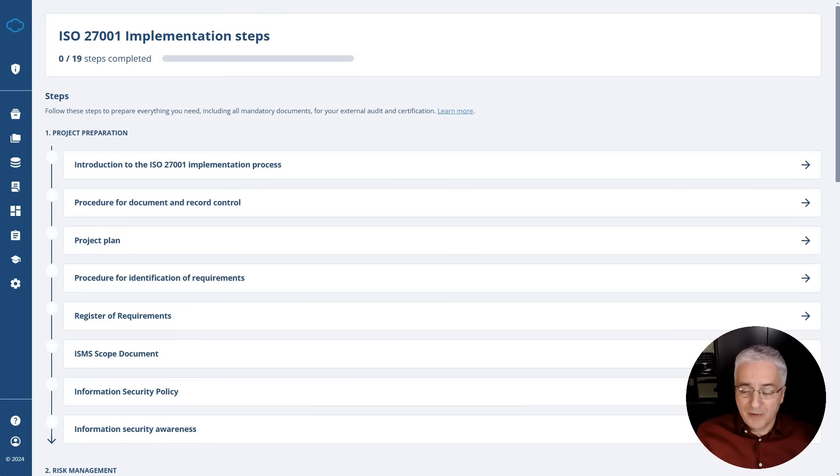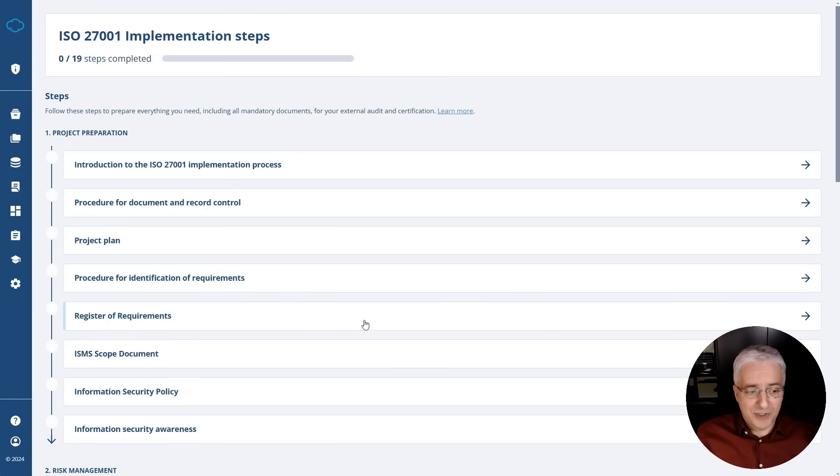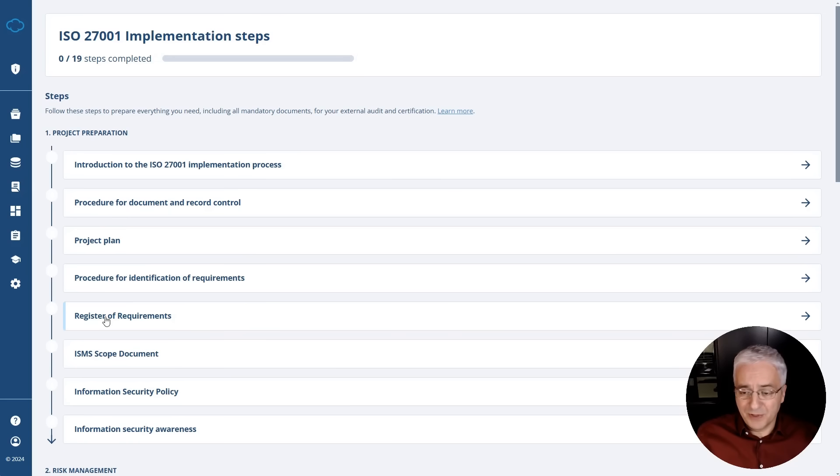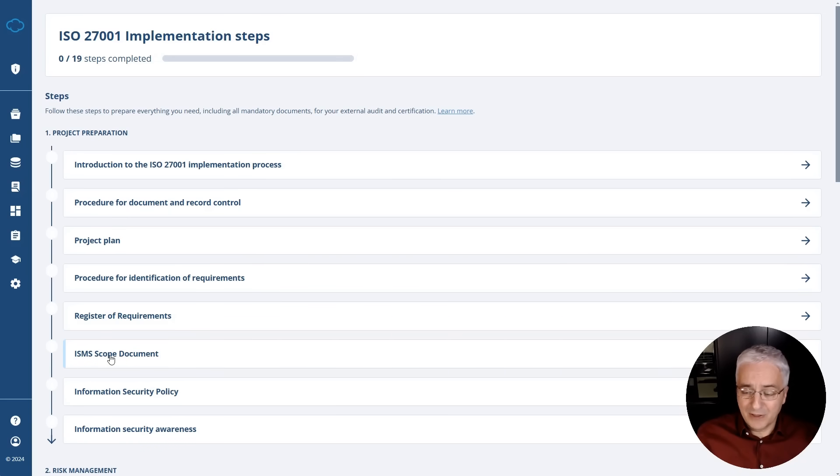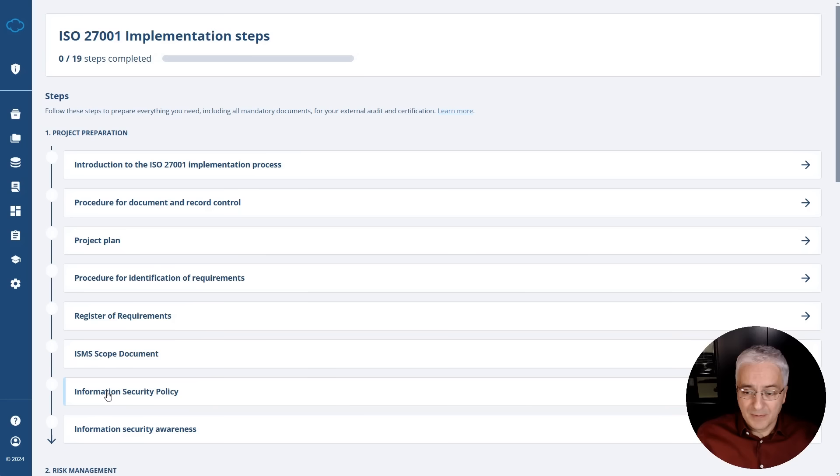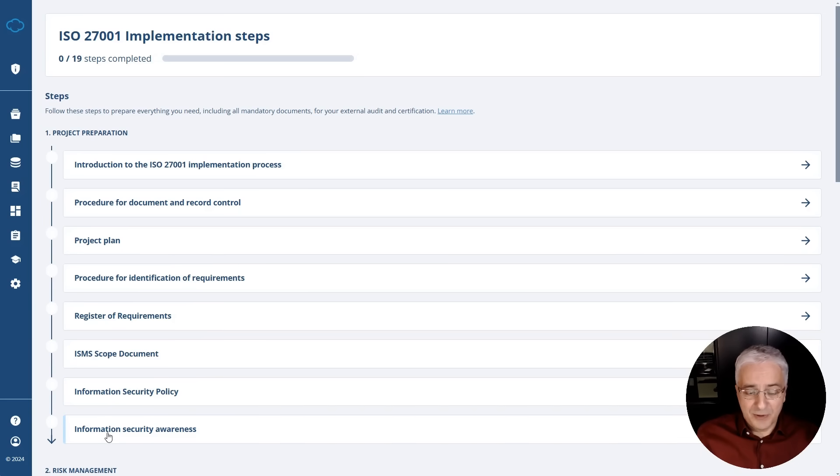And if you want to implement a couple of steps at the same time, this is also possible. And we see many of Conformio clients actually do so. However, there are some steps that you shouldn't skip or that you shouldn't do in parallel. For example, let's say this is a register of requirements you should not be doing before you actually complete the procedure for identification of requirements. Because if you want to list all of these requirements, first, you need to know the rules. You should not write the scope document before you collect all the requirements. For example, some of your clients might require a certain part of your company to be certified. You shouldn't be doing this top-level security policy before the scope document, because when writing this policy, you want to know how big your scope is. And also this information security awareness, you shouldn't be doing this before you complete